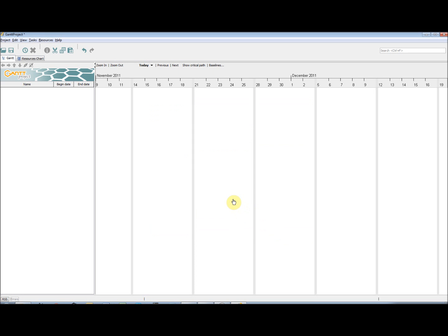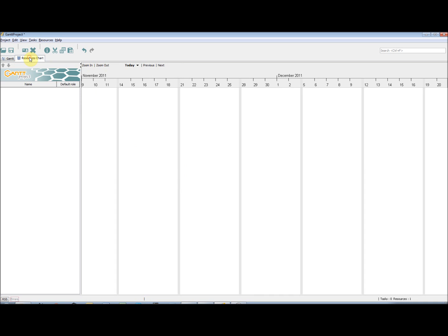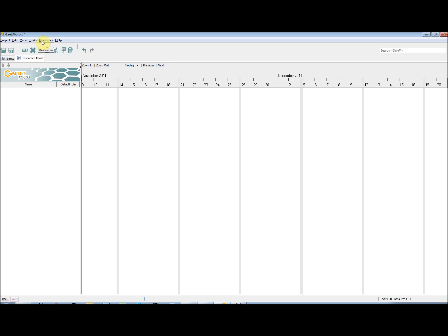Before we add the first task, it is recommended that we first add at least one resource. This can be done by any one of three ways. Either by selecting the Resources tab and right clicking in the Details pane and selecting New Resource, or by clicking the Shortcut on the Toolbar, or by going to Resources on the Menu bar and selecting New Resource.